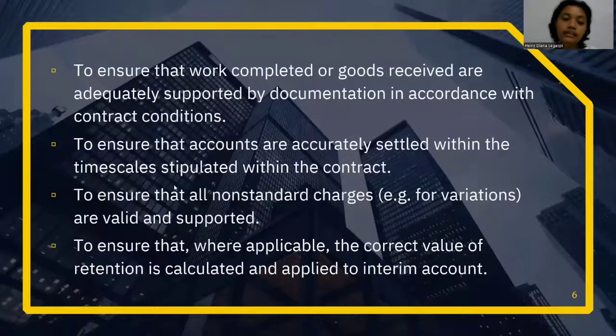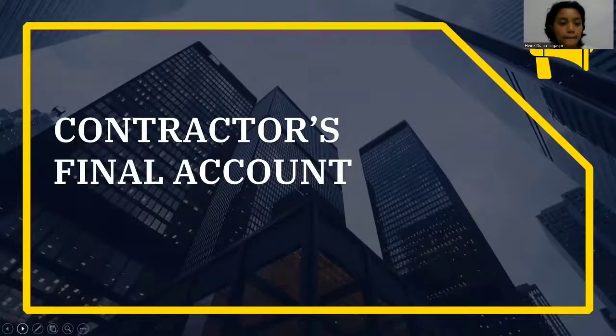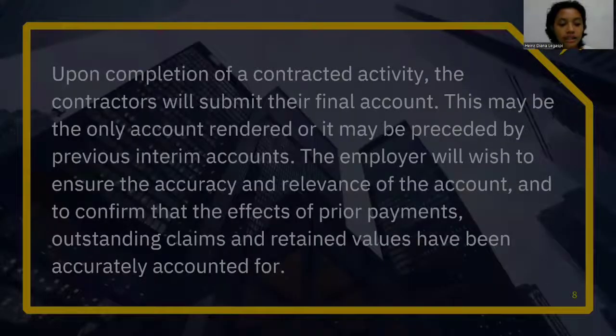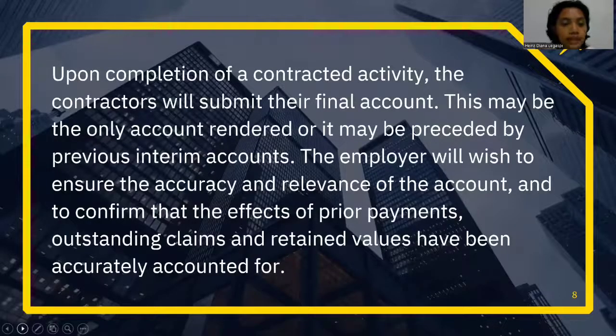So next we have the contractor's final account. In here, upon completion of a contracted activity, the contractors will submit their final account. This may be the only account rendered, or it may be preceded by previous interim accounts. The employer will wish to ensure the accuracy and relevance of the account and to confirm that the effects of prior payments, outstanding claims, and retained values have been accurately accounted for.